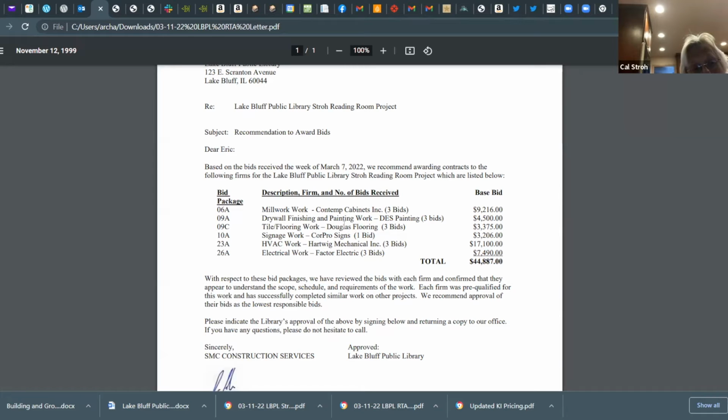Excellent. I assume this does not include running wiring for a TV. Is that correct? So currently it does include it. I'm waiting to get an amendment to the drawing, so I can just confirm pricing and pull it out. Once I get that drawing to find out what exactly we're deleting, I will get pricing for it. It'll be a deduct, and then we'll change order, whatever that is. Let's just say, round numbers, it's $500, that'll come off of that and then go back into contingency. Okay. Don't forget. I won't.